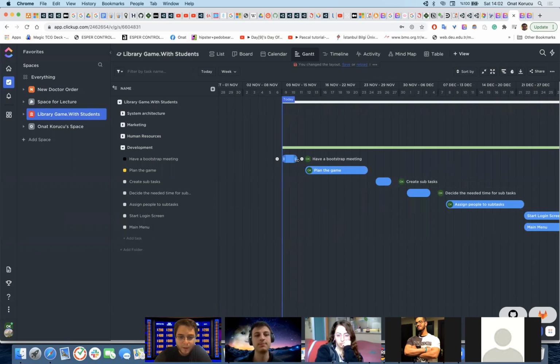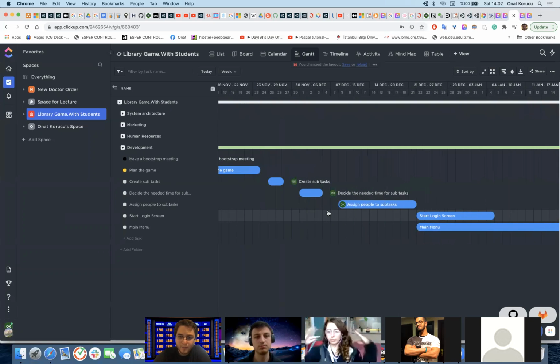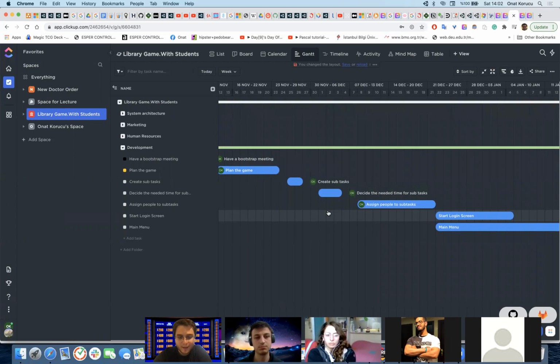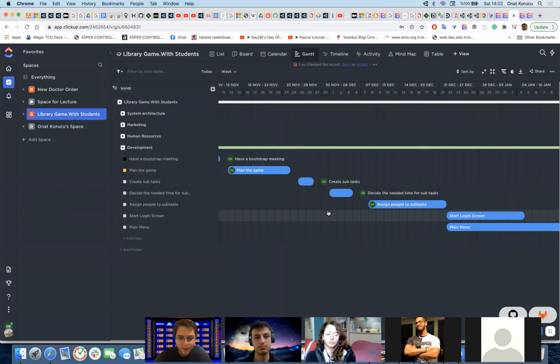Okay, good. Another good thing is adding dependencies. So in software development or in any process in general, there are dependencies. So you cannot start creating main menu without planning it. I mean, technically you can, of course, but it won't be used in the game probably.